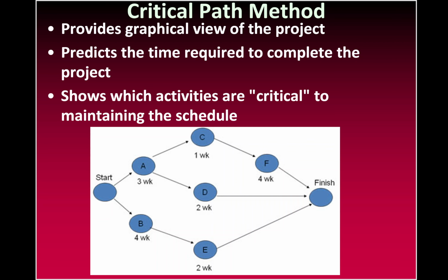The bottom line is once you have how long each thing takes, you then come up with what's called the critical path. So you lay out all of your tasks. There are certain tasks that cannot even be started until a previous task is complete. For example, let's go back to the building of the house. I cannot do the electrical work until the entire building is enclosed.